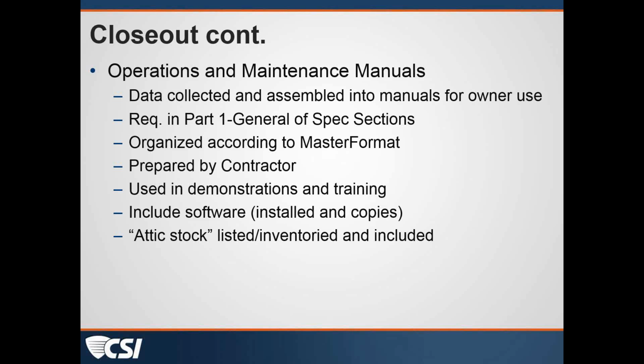I think one of the notes that's really critical here that I often see not happen: these are documents that should be prepared and reviewed and ready for use in the training process that the owner's personnel go through, whether it's demonstrations of how the equipment operates or actually hands-on training.